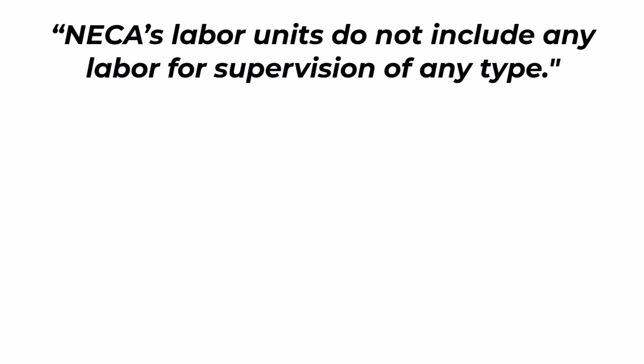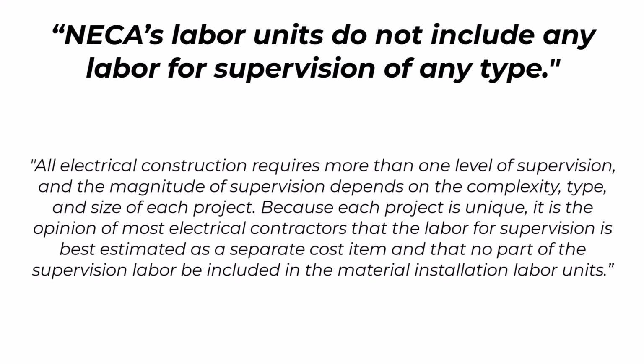I should point out that NECA states that their labor units do not include supervision. Here's a direct quote from their website. NECA's labor units do not include any labor for supervision of any type. All electrical construction requires more than one level of supervision, and the magnitude of supervision depends on the complexity, type, and size of each project.